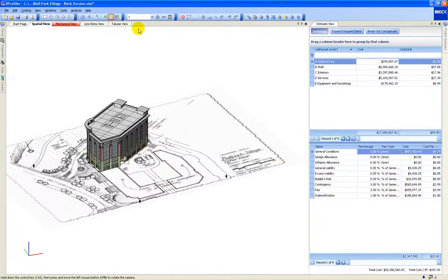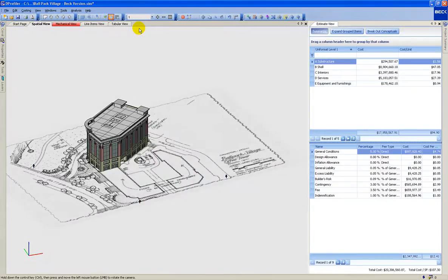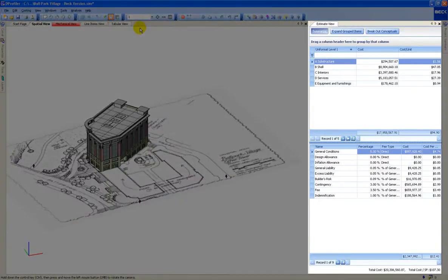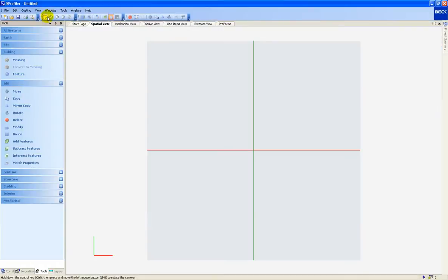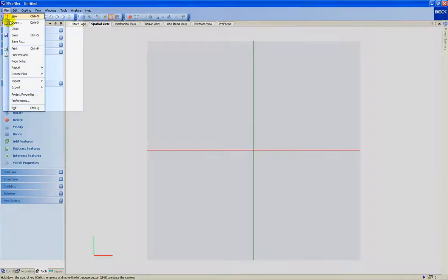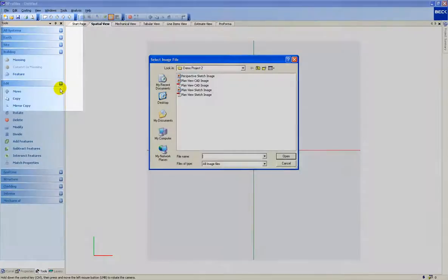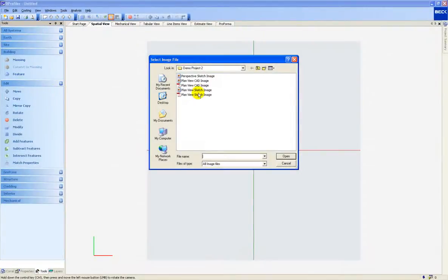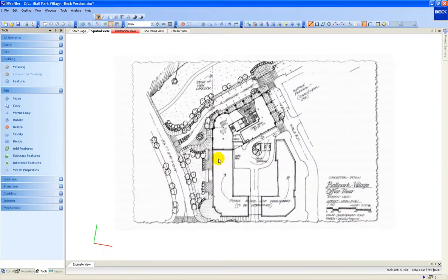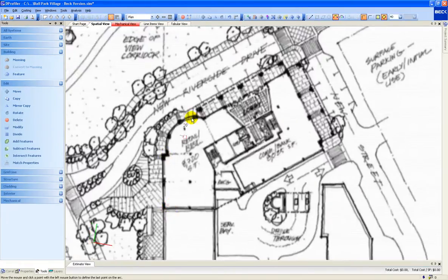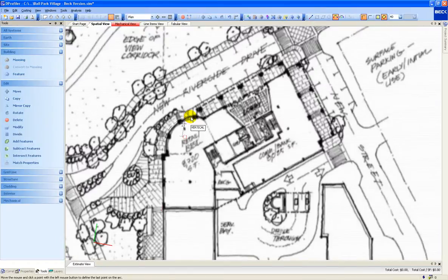This is accomplished by loading construction cost data directly into a conceptual 3D model. Models are created directly in dProfiler and are often started after importing an image, PDF, or CAD file of the concept. After importing, the user can simply sketch over the image to create the 3D model, thus creating the quantity data.